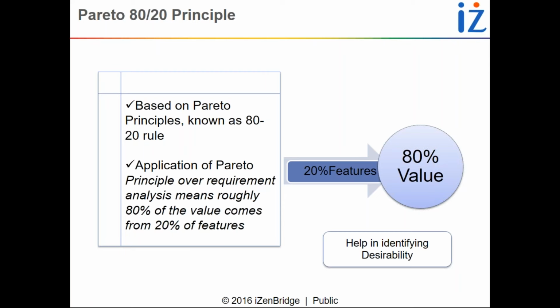In some organizations, there could be a rule that you will have 20% or 50% of requirements in must have for the solution. This constraint, this rule, forces stakeholders to think about those 50% of requirements which should be in the solution, and for that they work collaboratively on what basis those requirements will be selected from all the requirements.